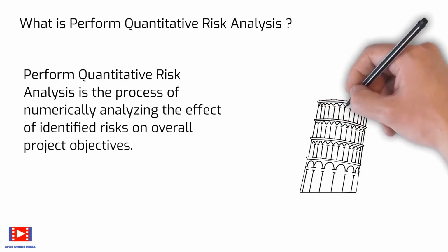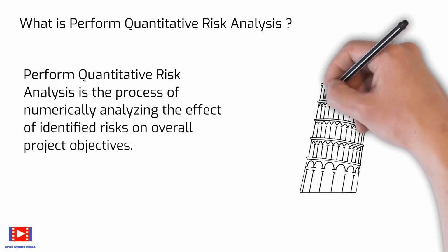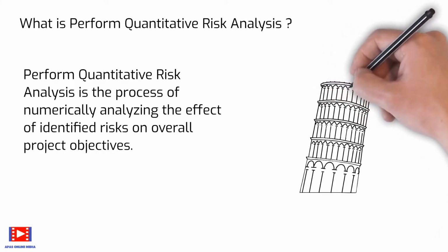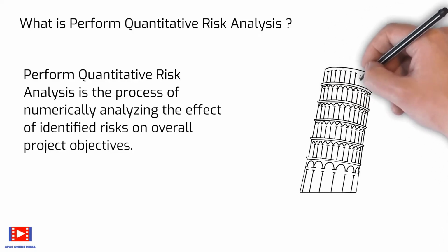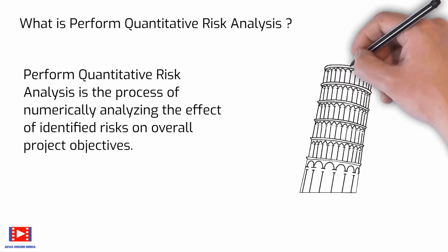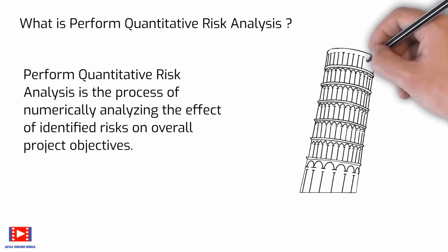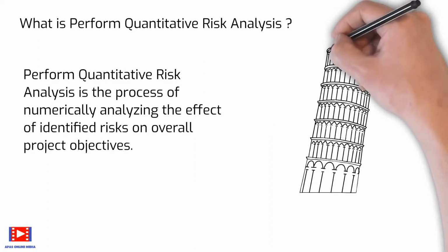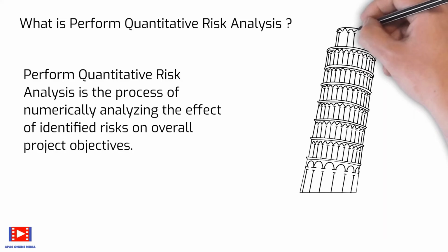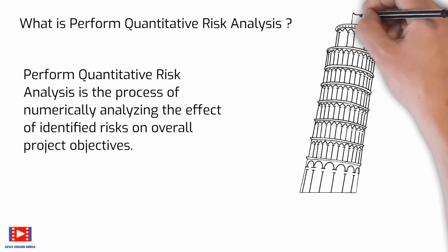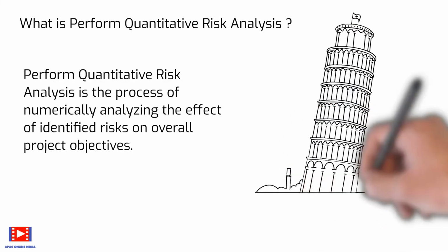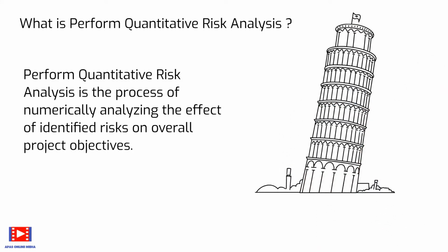Perform quantitative risk analysis generally follows the perform qualitative risk analysis process. In some cases, it may not be possible to execute the perform quantitative risk analysis process due to lack of sufficient data to develop appropriate models. The project manager should exercise expert judgment to determine the need for and viability of quantitative risk analysis. The availability of time and budget, and the need for qualitative or quantitative statements about risks and impacts will determine which methods to use on any particular project.